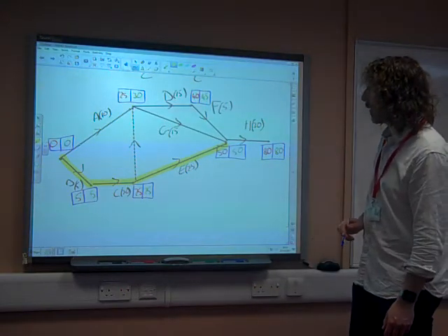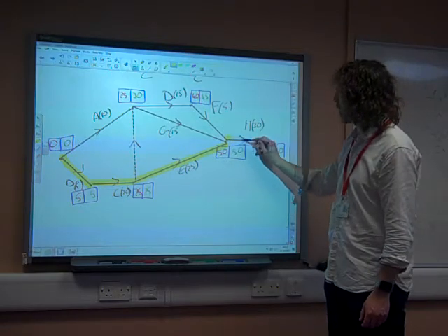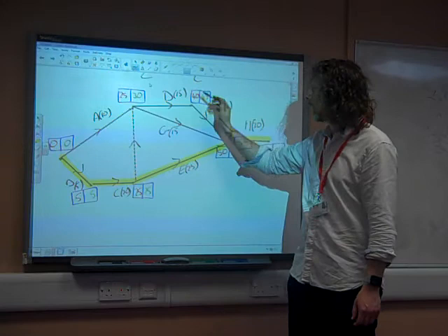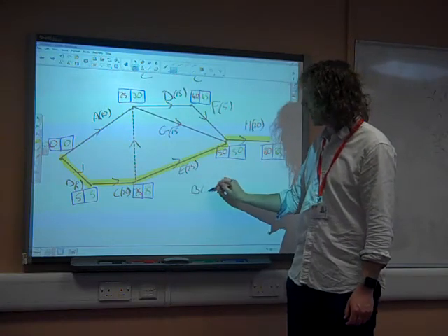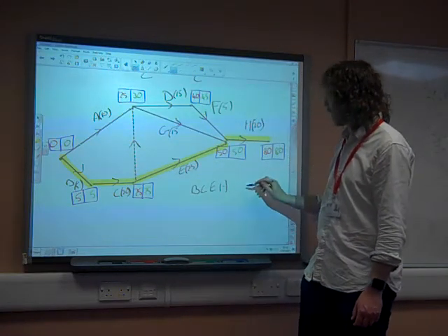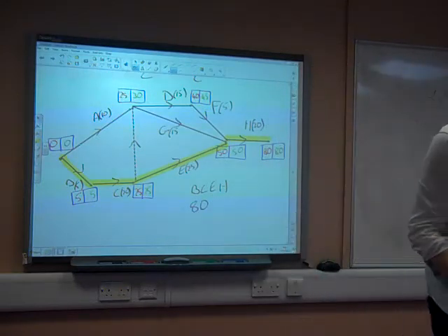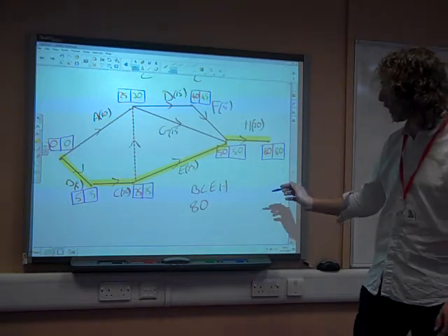So there we go. H is the other critical one, so we're going to list our critical activities, because that's what it asked us to do. B, C, E, H, and the total time is 80. I don't think we needed to give a unit, but it's minutes that we were talking about.